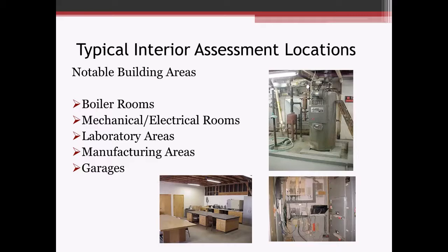Laboratory areas that we discussed before, science laboratories in schools and universities. They're going to be handling possibly different compounds, chemicals that might get on the bench tops, might get into the sink drains, sink traps. So good to look at those. Some of them might have special acid drain lines where your acid type residue would go through. So those drain lines should be handled and disposed of separately from other things in the building. Manufacturing areas, garages, all those areas would be high risk areas for different hazards.